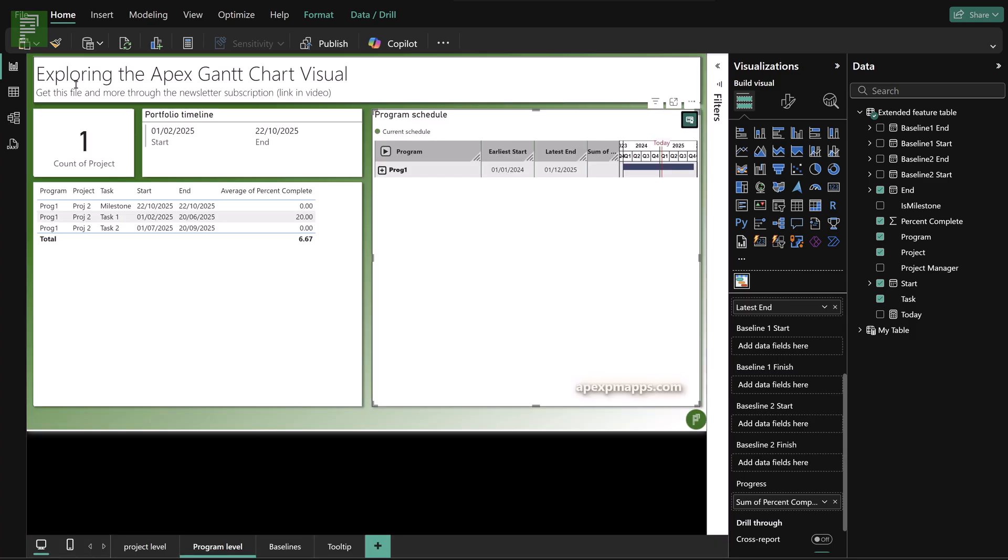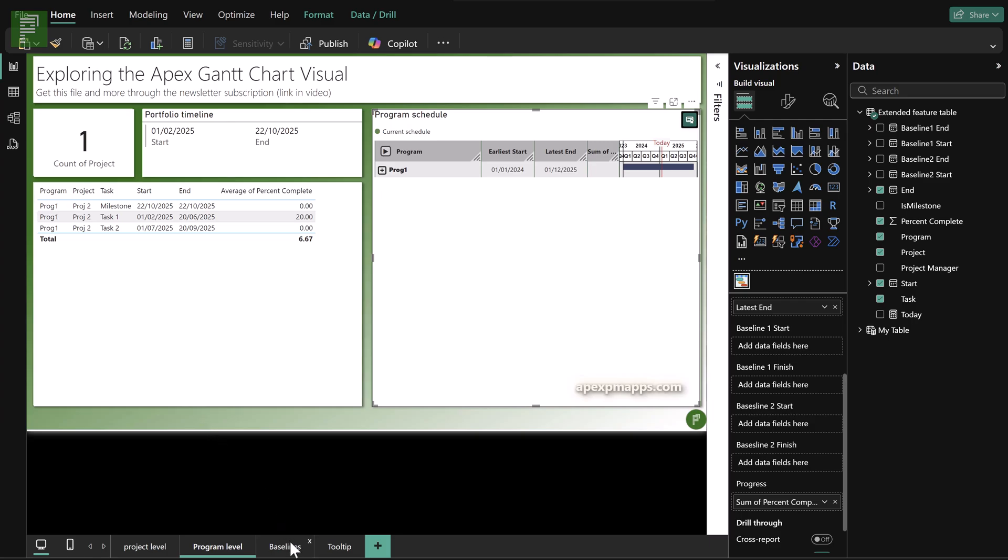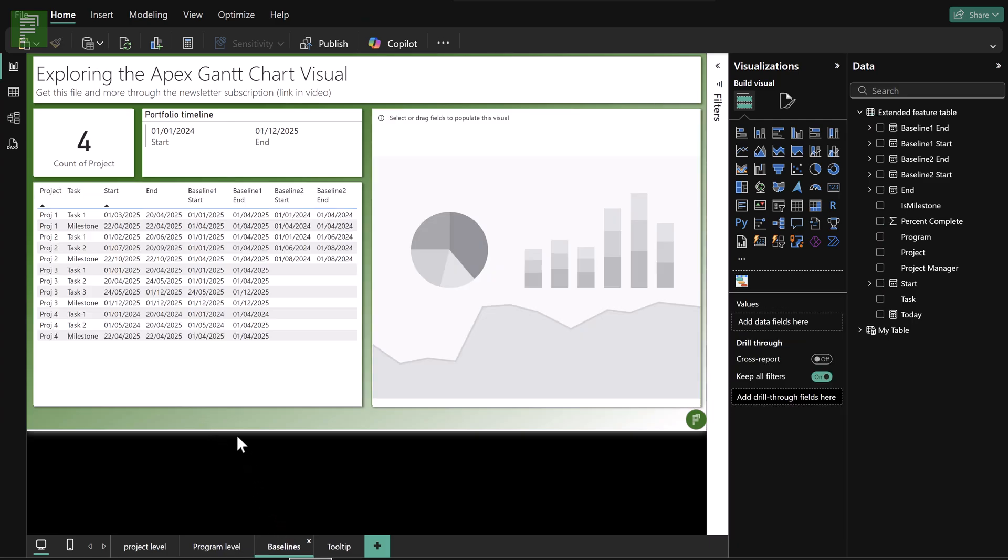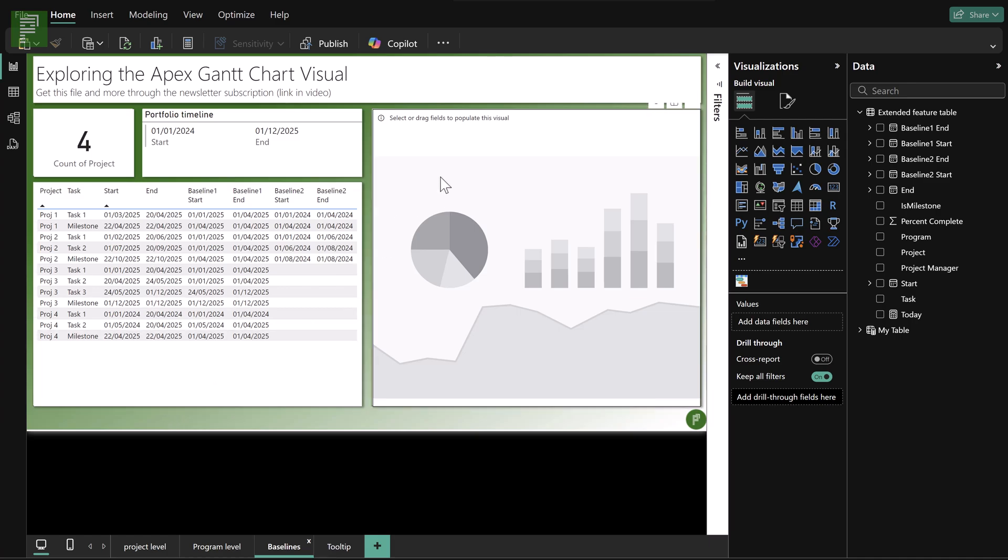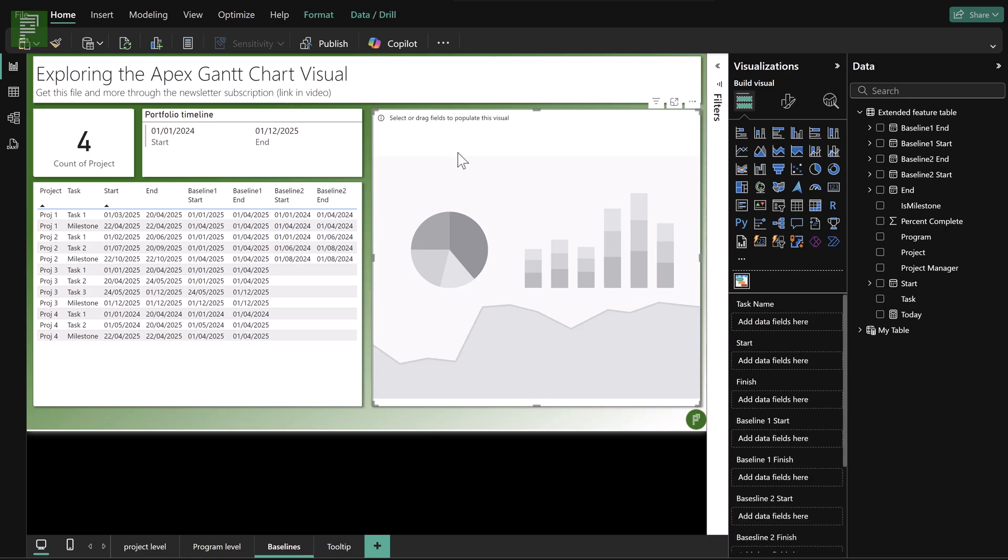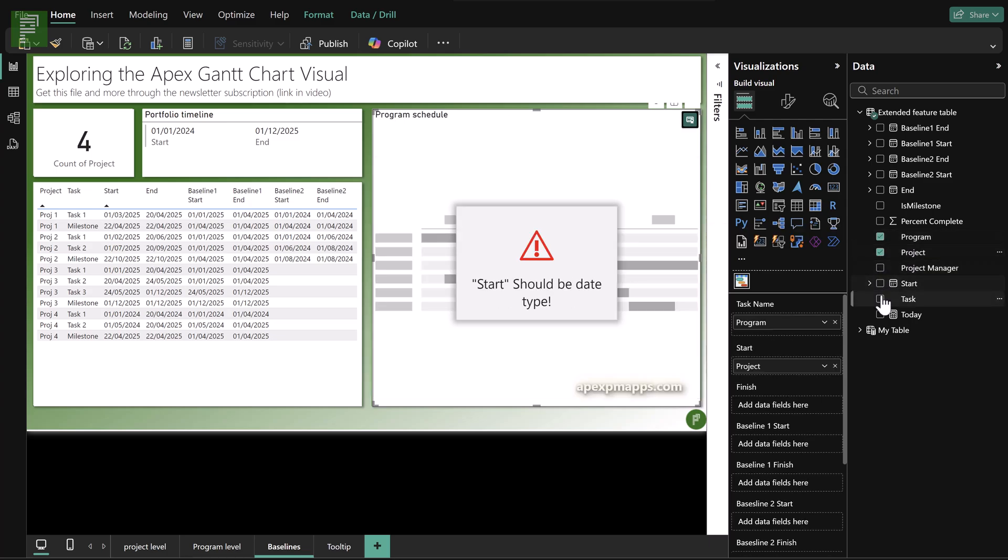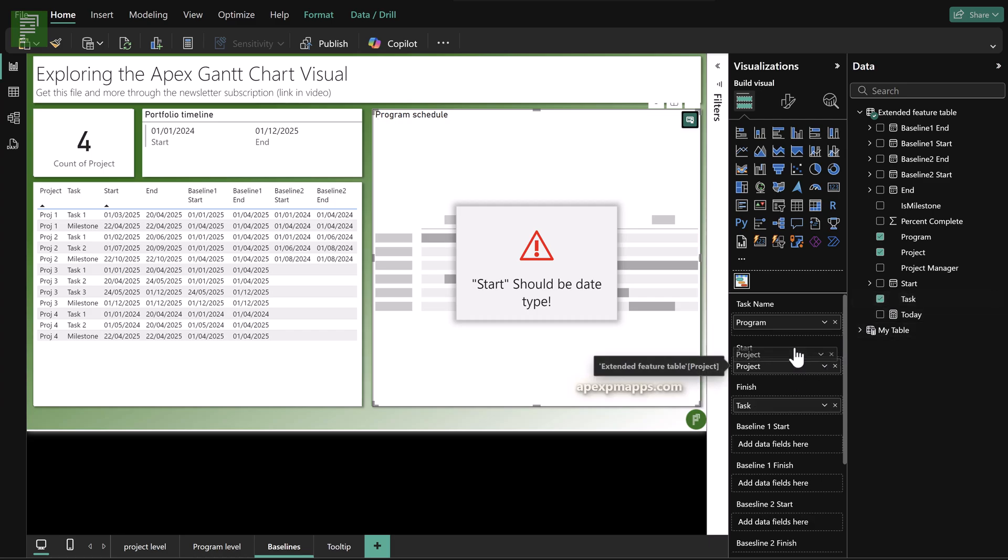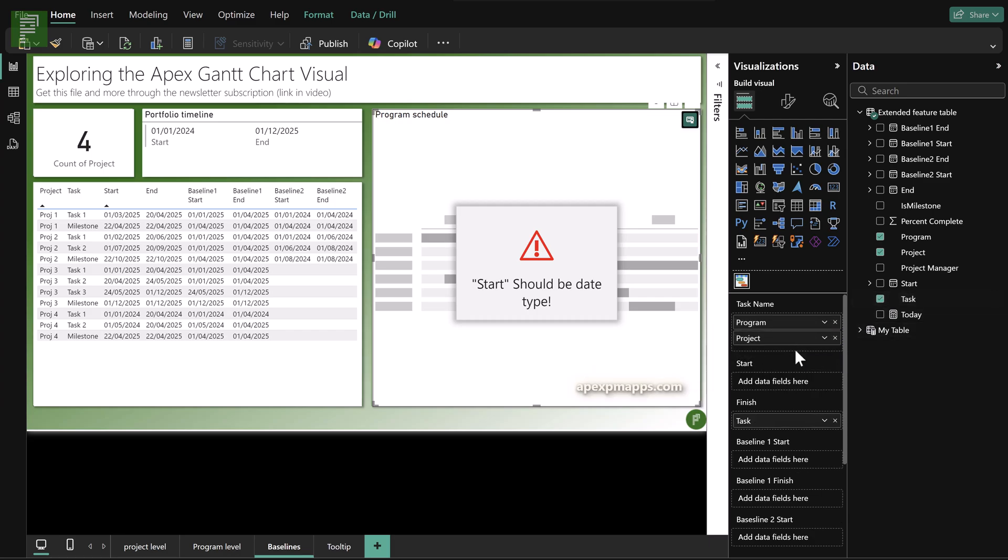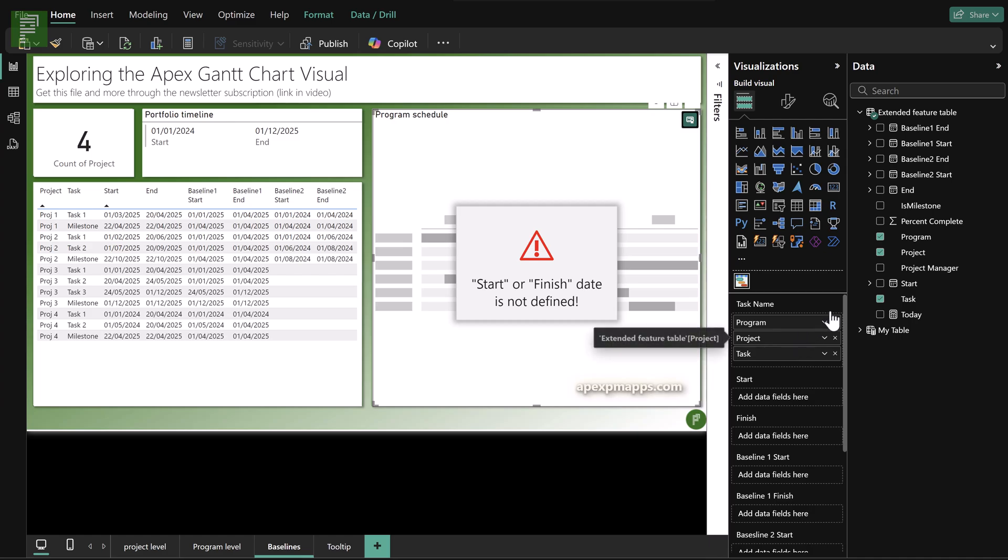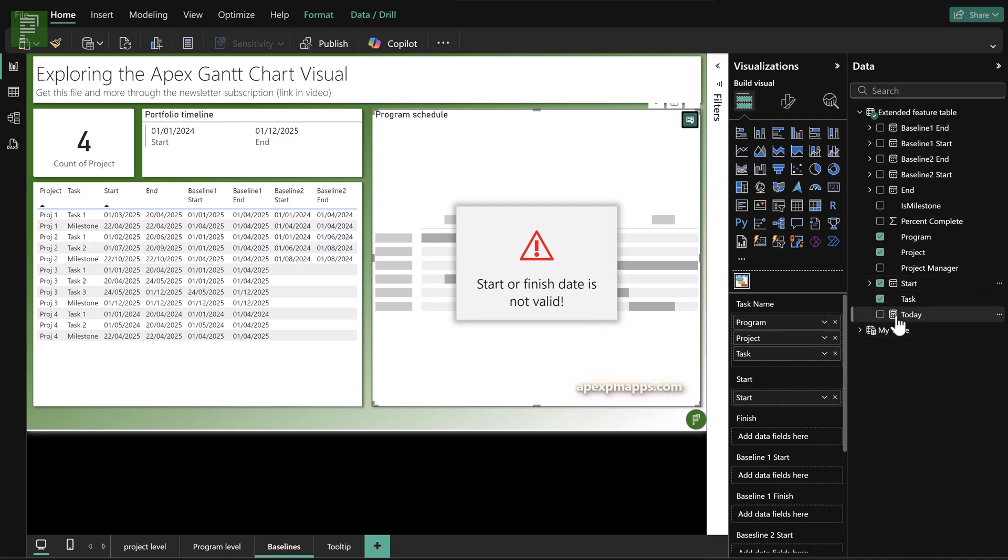So this is the first additional feature or extended feature that I wanted to share. There's more information that you can add to the Apex Gantt chart visual. And that resides in the baselines. So the baselines are a very important concept within project management. You always want to have a baseline, at least one, where you have the option to visualize or represent the original intent of your schedule and where you're actually at in the real schedule scenario or in the current schedule scenario.